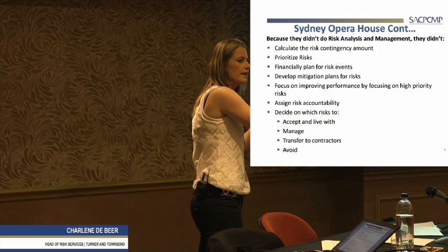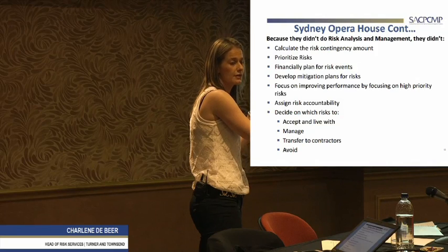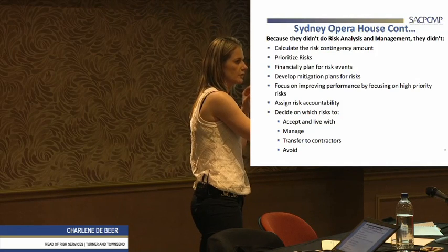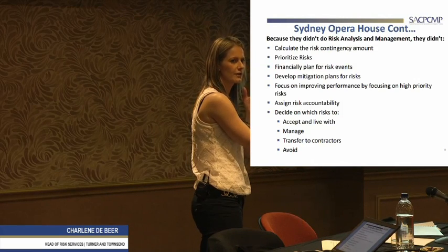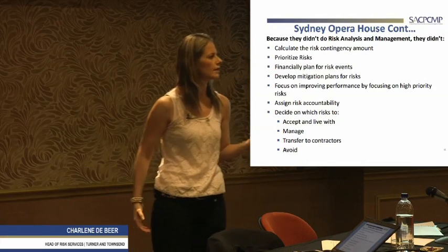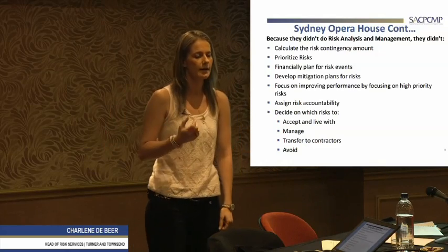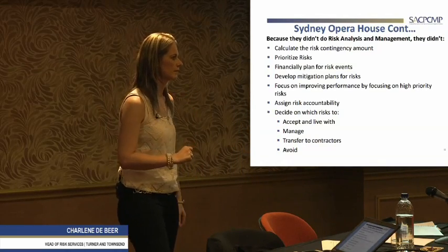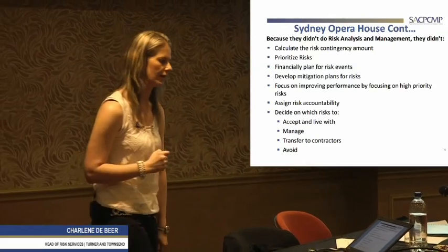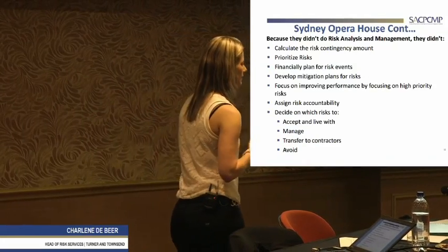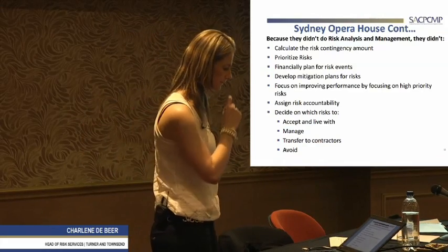materialize. And that's why if you have 5 causes to a risk, you should actually have 5 or more treatment mitigations in place. Because sometimes you can have more than one treatment or mitigation idea for one of the causes, but you can never have fewer mitigations and treatments than the causes, because it means you haven't addressed all the causes. Maybe at that point in time you're not quite sure how to address that cause, which is fine, but then you should know that you can never mitigate it away, because you haven't identified all the mitigations to all the causes. That's very important, and if we can remember that, we are already winning in the sense that we will know what exactly to do and what we need to treat, not the risk, the cause.